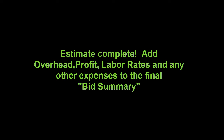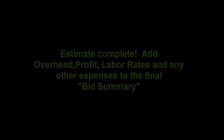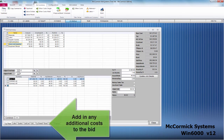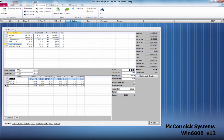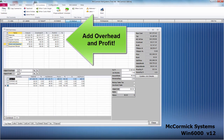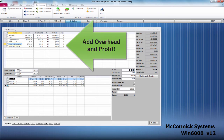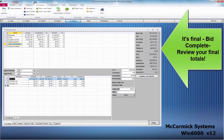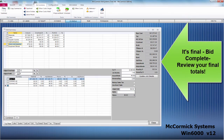Estimate complete. Let's jump over to our fifth and final button, Bid Summary. This is where we will fill in our final costs. Use the tabs below to fill in any subcontractor, direct job expense, equipment rental, or any other additional costs. Finally, add your overhead and profit to each cost breakout. Review your totals on the column to the right. That's it — bid complete and ready to present to the customer.